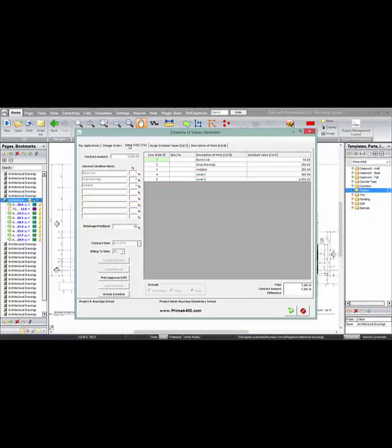After that's been completed, we'll come back here and we'll assign the contract value. Could be over or under your estimate itself, depending on your market and market conditions. We'll place in here the fixed cost up front that you would want to include for bond cost, shop drawings, mobilization. Those values would be reserved at the very top of the schedule of values, and they would be a true percentage of what the contract amount is.